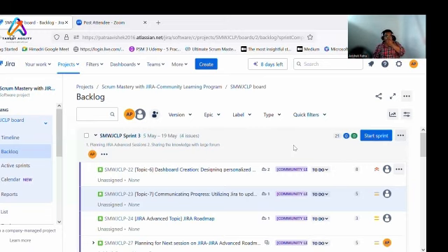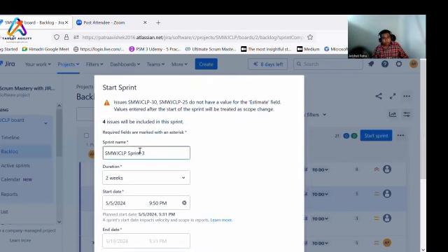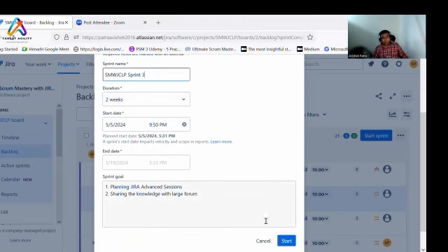Now we are in the sprint planning. You have a common understanding with the sprint. Everyone agrees that we can start the sprint. You can start the sprint. When you start the sprint, this window will pop up. You see whether you are starting the correct sprint or not, because you might have created multiple sprints. What is the duration? Check the sprint goal, and then you start.